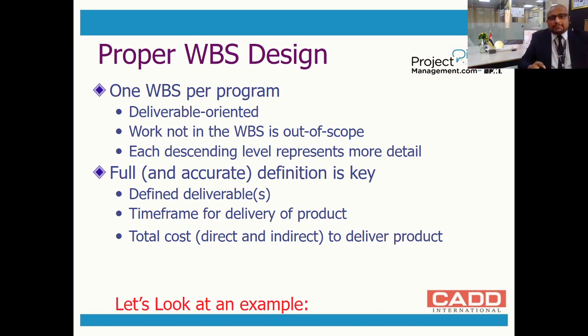Each descending level represents more detail. As I said, ground floor and first floor. In the ground floor, you can have further subdivisions. In the ground floor itself, you can implement the civil works, MEP works, and the interior works. So structure by structure. What happens when you have a proper WBS design is that the project becomes much easier to evaluate. So it gives you a proper schedule or structure to implement the earned value analysis.